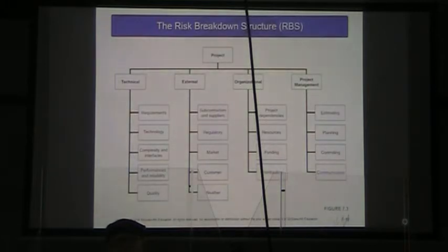What do our customers want? Always something that we should be worried about. Is what we're doing going to be satisfactory to the customers? And is weather a factor? If we're doing a project where everything is indoors, we don't expect any major events like hurricanes or tornadoes, weather's probably not much of a factor. If we're going to be building something outdoors, weather becomes a huge consideration.